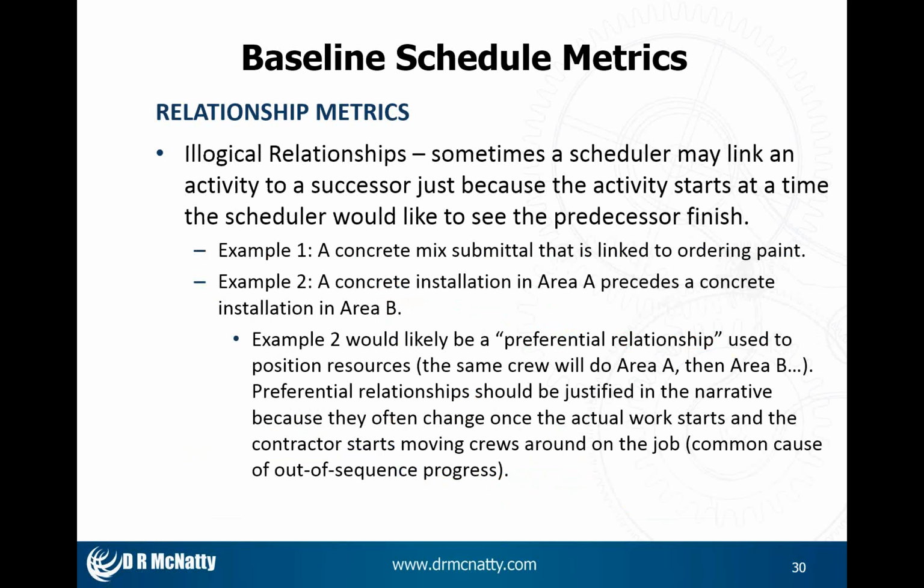Relationship metrics, illogical relationships. Sometimes a scheduler will take an activity and link it to a successor just because that's where they want to see the end of that activity cut off. He's looking at a time frame. So an example might be a concrete mix submittal that's linked to ordering paint. It may not make any sense to the reviewer, so you need to check on it.